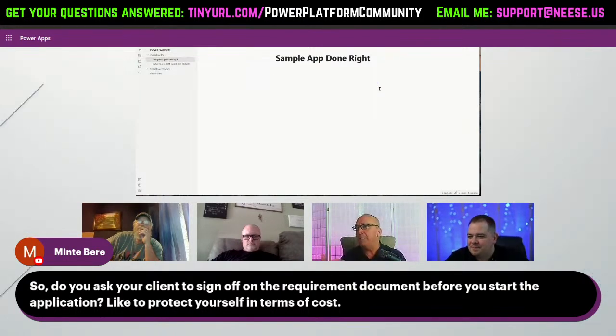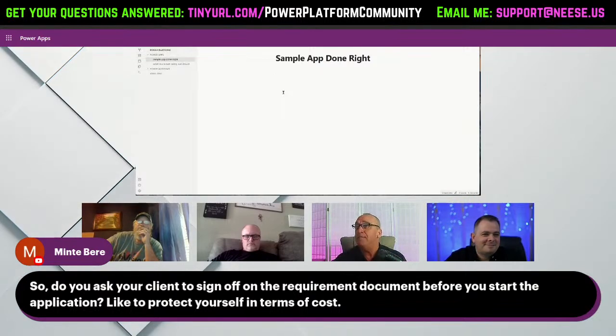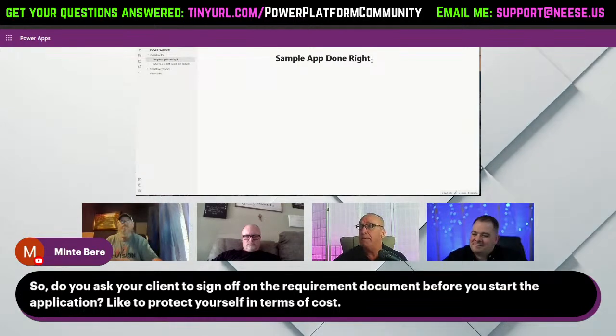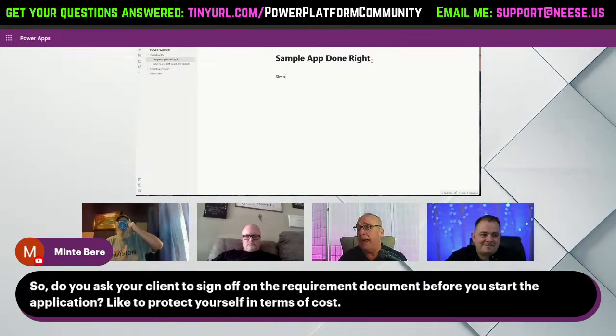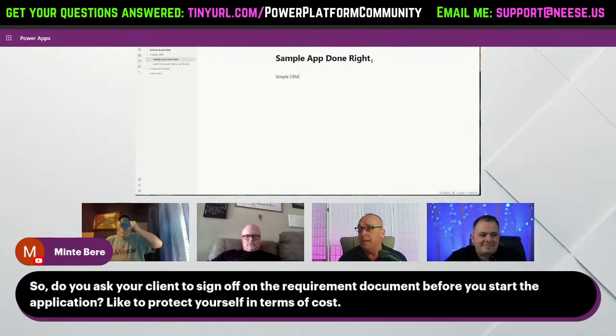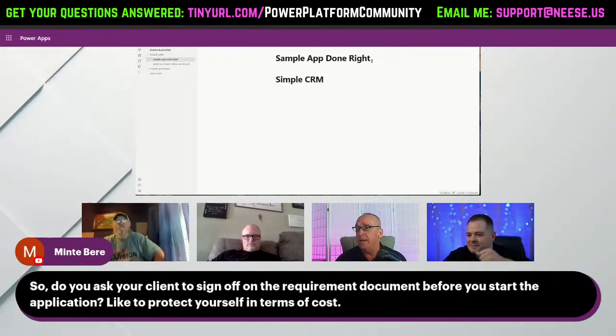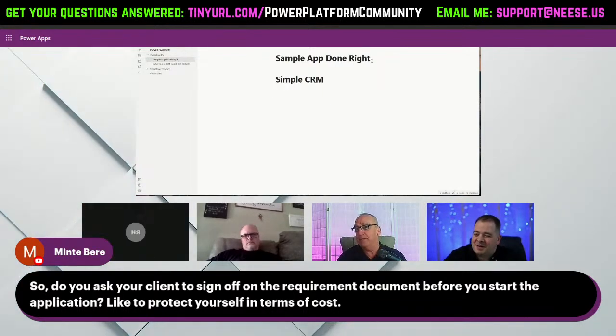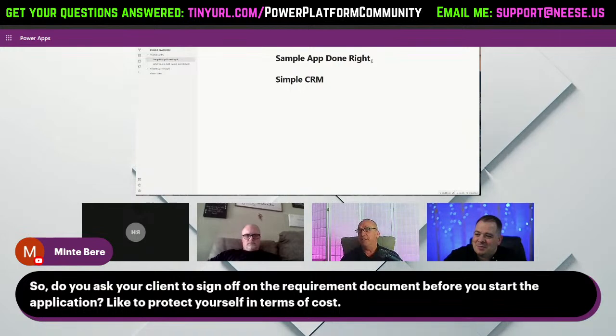And maybe you guys can work out an agreement from the beginning, saying that maybe that needs to be up front, a discussion about how this is going to grow. Maybe we need to teach Snuffy that this is the way software development works. So that way he knows when he's paying $40,000 for this program initially, now it's going to cost $50,000 because he wanted these changes, right? So, yeah, so much to that, man.